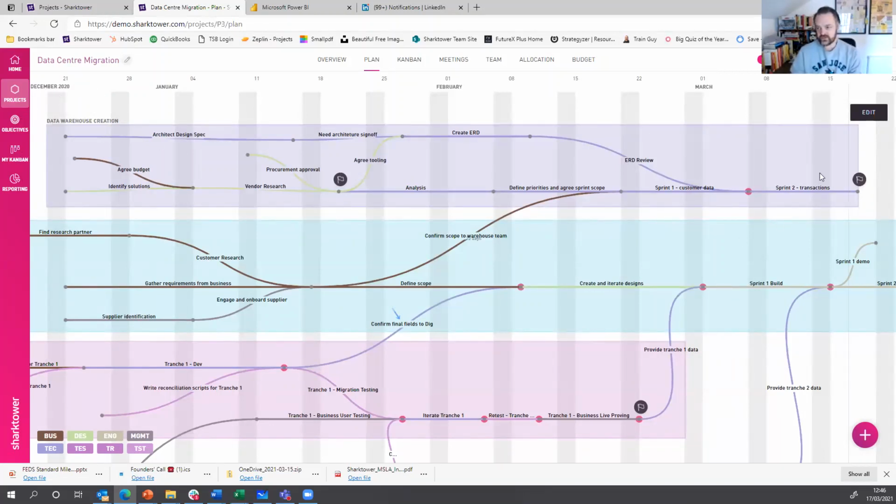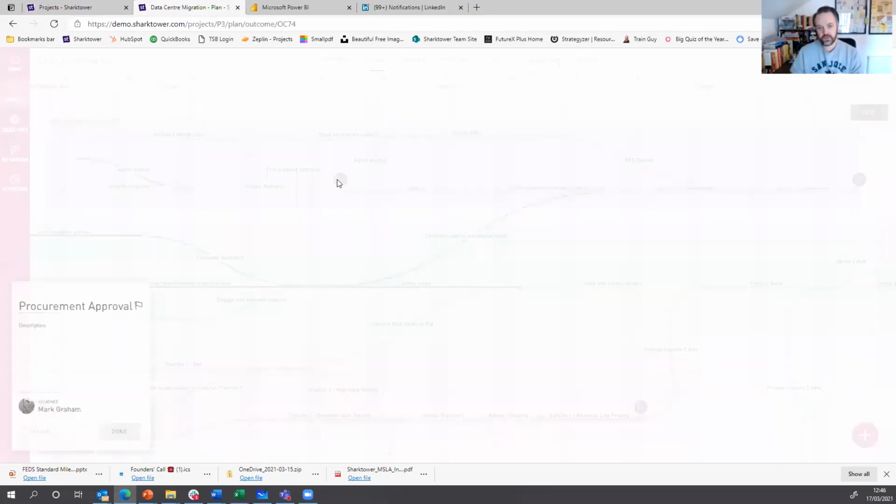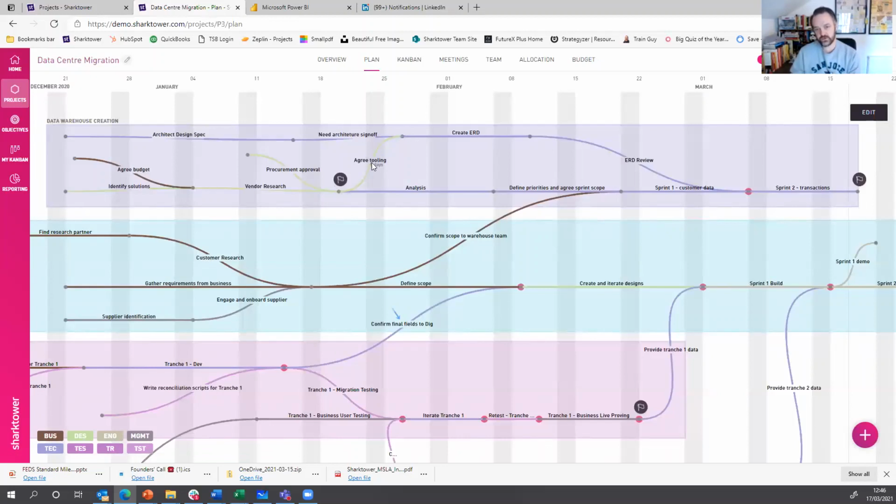And then those can be grouped into sub-projects. They could be epics, they could be themes. Again, we can have pre-project milestones coming up, such as procurement approval, that allows us to move on to the next stage to acquire the tooling required. And then show dependencies inbound from other projects that come into this program.